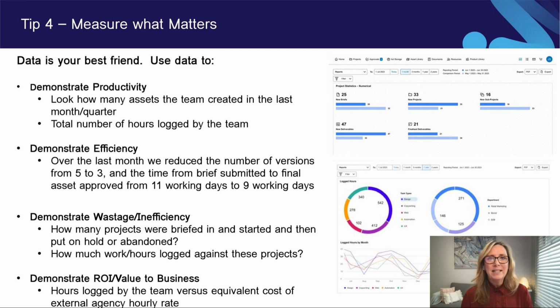One of the other things that we see some of our clients being able to demonstrate is also wastage. And we're talking about wastage of resources here and inefficiency that maybe just creeps into the business. So for example, you might like to report on how many projects were briefed in and started, and then for whatever reason, they got put on hold or abandoned. And how many hours of work maybe have been logged against those projects.